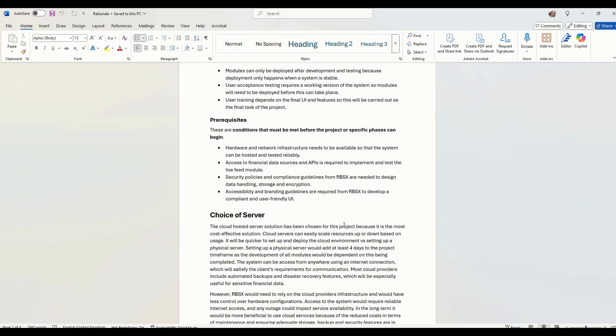Access to financial data sources and APIs are required to implement and test the live feed module. So API is some external module or library provided by somebody else. So we need to have access to those.